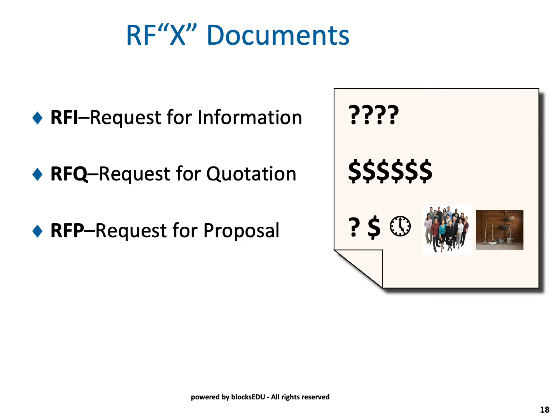A request for quotation is basically when you know what you want and you can explicitly tell what you want, and you can send it out to different organizations, and they are fundamentally competing on price. As simple as that. Now there is another RFQ. It's called a request for qualifications.